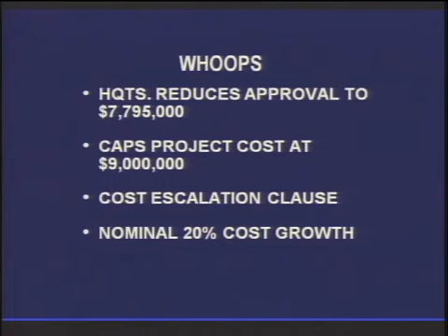One example would be if the contractor needed a big piece of equipment they were going to buy from somebody, and when they made the initial bid, the supplier said it was going to cost X dollars, but then when it came time to buy it, the supplier said it was going to cost 1.1 times X. Then that would be a legitimate cost escalation, that 10% increase. That would eat into the difference between the 7.8 and the $9 million, but you're not going to exceed the $9 million.